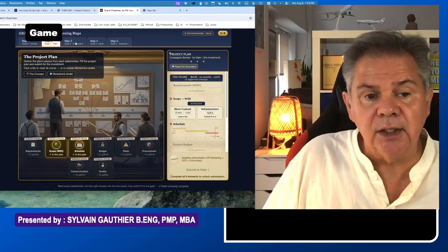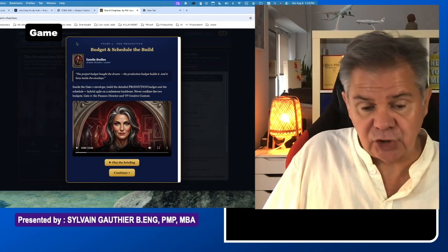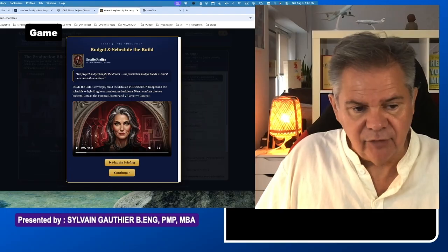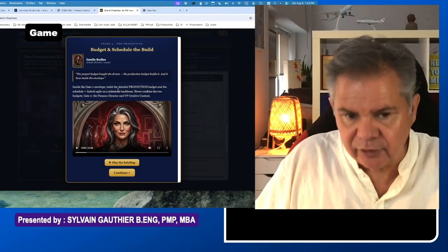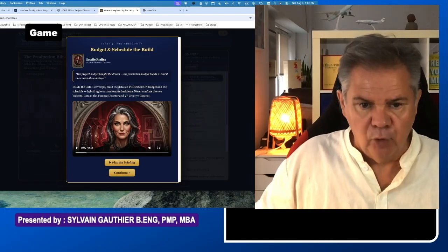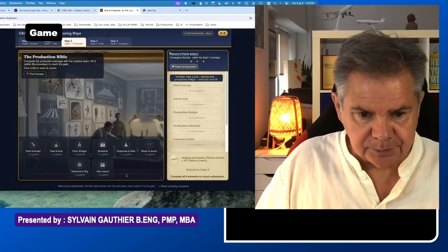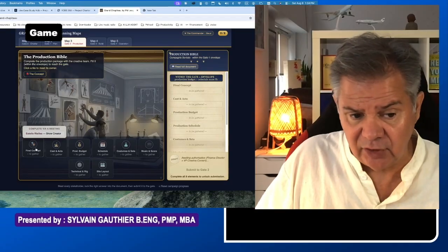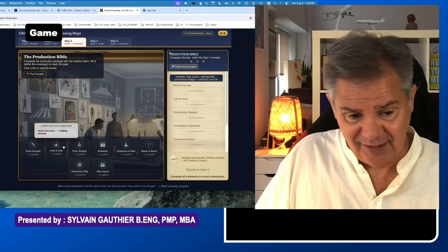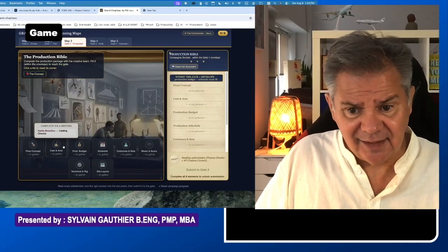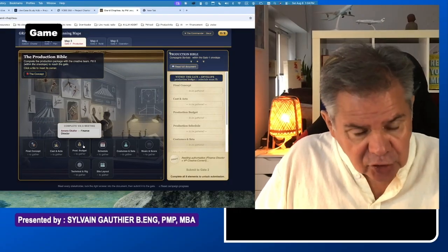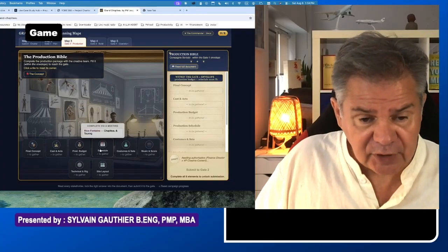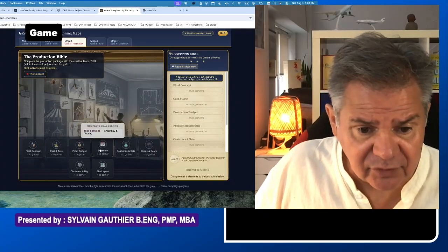Once you submit it, you are ready for your production Bible, which is the actual building of how you're going to build the show itself, versus the overall project that's got a lot more than just the production. In the production Bible, what we need to do is to finalize a concept, casting, and act, selecting that, do the production budget, which is a subset of the overall project budget. A production schedule, again, a subset of the overall.